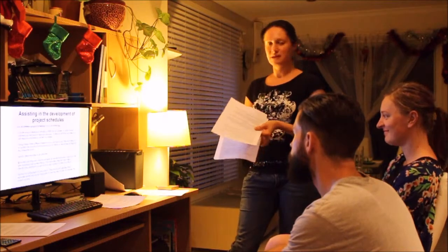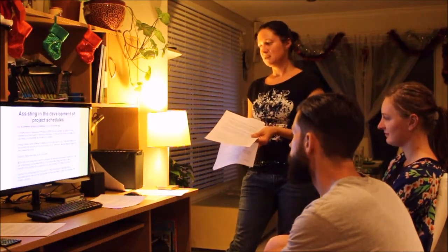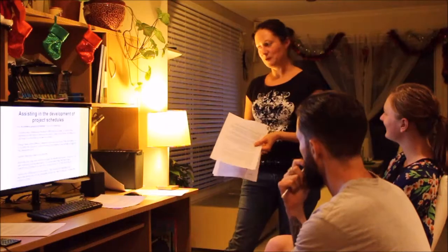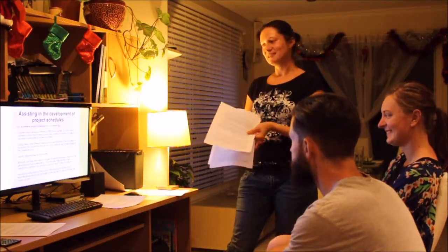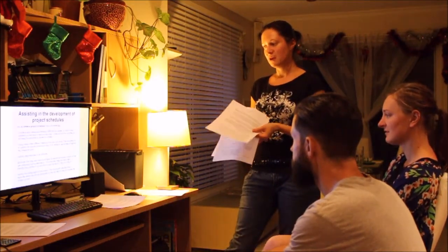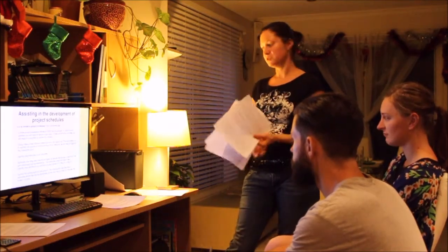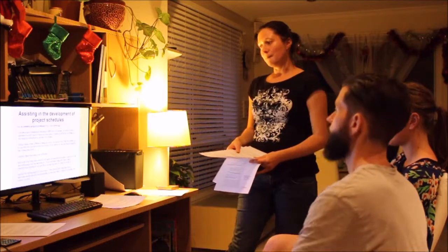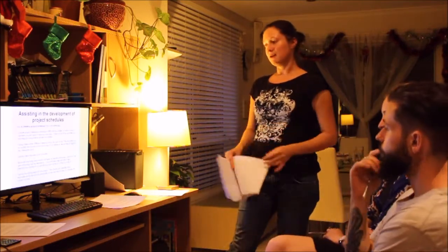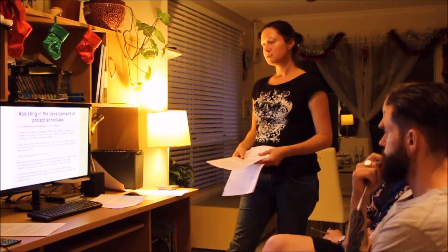If you estimate a task will take 3 days, it may actually take much longer. So you have to identify how confident you are that you can deliver this task in 3 days, by using a percentage sign. Also, you have to identify the critical path for the project.